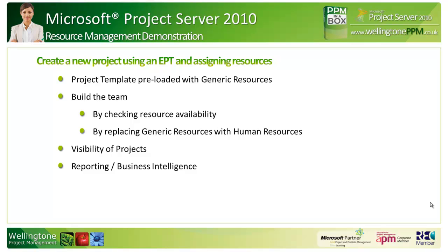I'll use the build team function to check resource availability and replace the generic resources that have been put into the template. I'll also show you how you can increase visibility of projects using Project Server 2010, and we'll show you some resource management related dashboards.